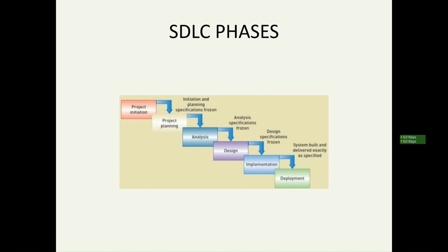First, normally the customers will come and give a requirement that will be given to the business level people. They will get the requirement and do a feasibility impact analysis, how much is going to be written, whether everything is feasible or not, technology-based, everything they are going to calculate. Once the contract document and everything is done, the project kickoff will happen. That is nothing but the project initiation phase.